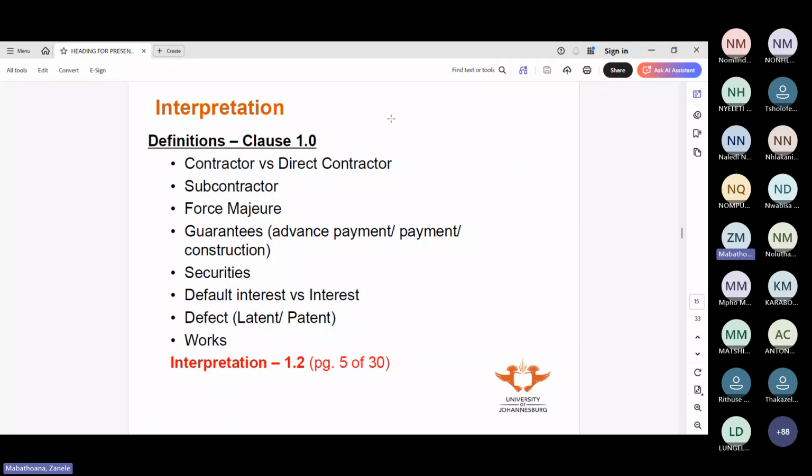Then interest is what the client would be entitled to if there's a delay, which is sort of the bank rate applicable. So your prime lending rate is what would be used in the event of interest. It's calculated each calendar day of the month and compounded annually. So again, economics comes in handy here, where you did time value of money and you know what compound is and how we compound monthly or annually. So that prime lending rate is an annual rate.